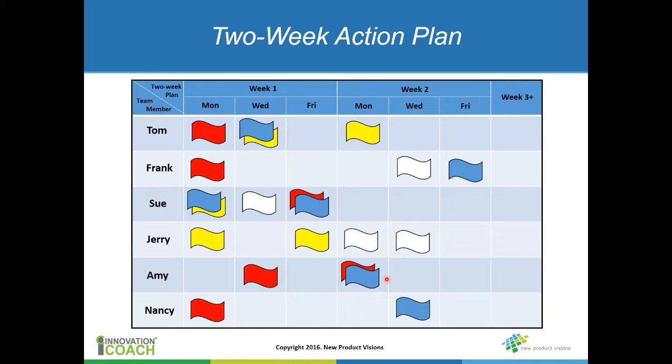And it's really the responsibility of the team members to come up with these tasks based on the deliverables that they're working on. It's really only the team members that can pull those things apart and figure out what the tasks are. Maybe all these tasks are related to designing a printed circuit board. Well, you've got to break that down. Sometimes engineers don't like to do that, but that's what this method relies on, is getting people to think about how to break tasks down, how to break their workflow down. That's really a key aspect of this.